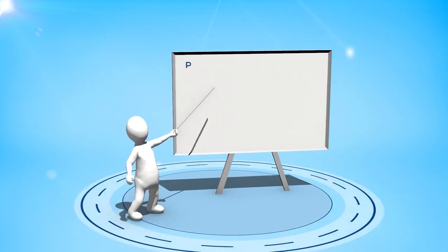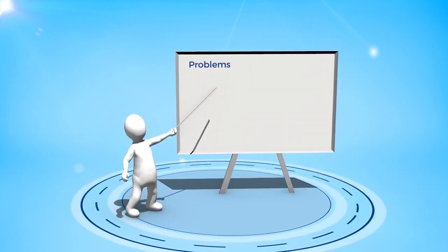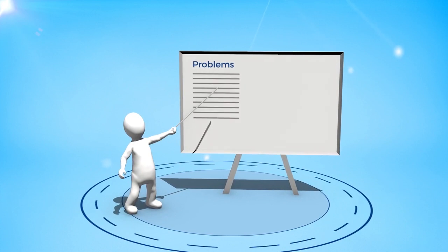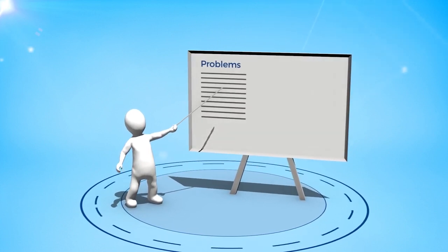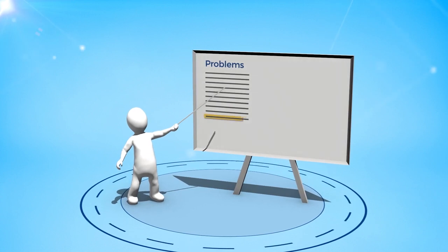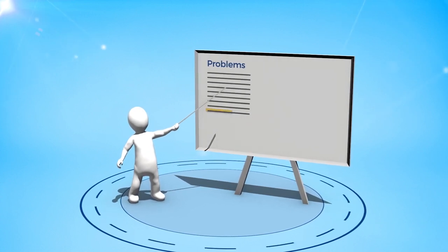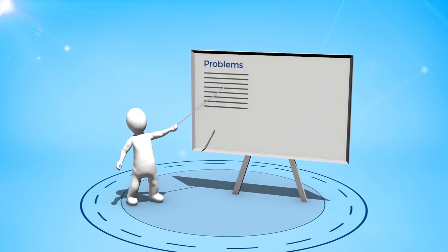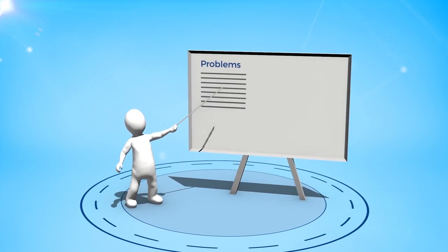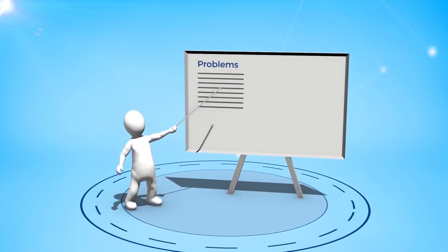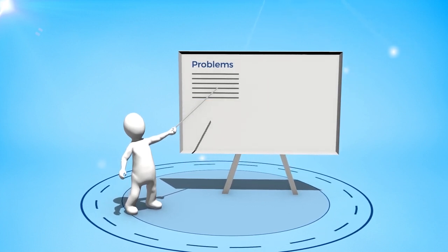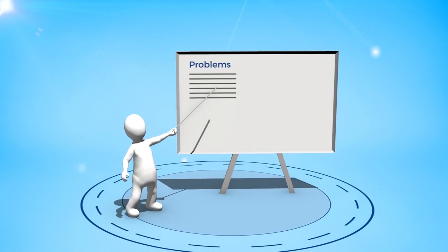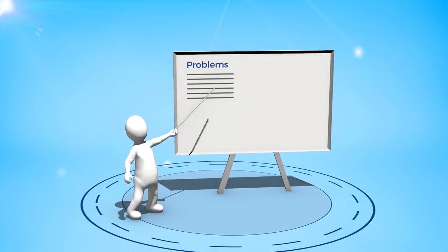The second step in a pre-mortem is to identify the top problems. During this step, select between 5 and 10 problems to focus on going forward. The focus should be on problems that are critical to the project. Minor issues should be avoided. Identify issues that will likely happen and tackle problems that are inevitable. Discard problems that you cannot control, such as external risks. Instead, focus on problems that can be corrected.